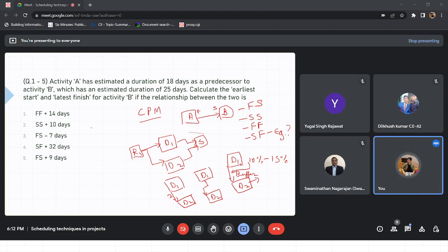I'll just talk in basic terms. Let's suppose that you have to decorate a room. To decorate a room, you have to paint the walls, and you have to place the furniture. Two tasks. Now, if the painting has started, even if just one wall or one corner is done, you can start placing the furniture at that corner, right?